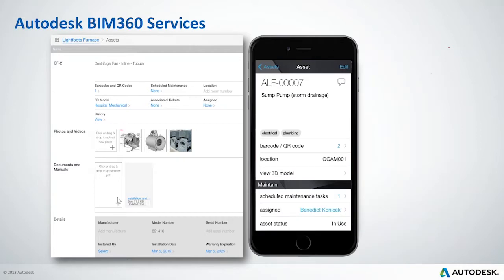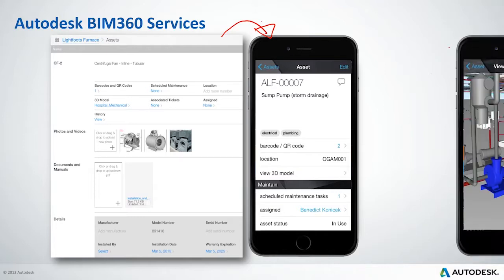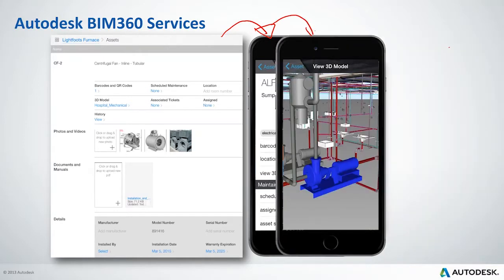But let's move forward one more time. When we turn that building over to the owner, on day one of turnover, there needs to be maintenance and operations ready to go in case there's some kind of a failure of equipment. So the operations piece actually leverages the data from Field. So the barcode information, the model information, if there are any models there, it comes through. If there are no models, then it's the drawings.